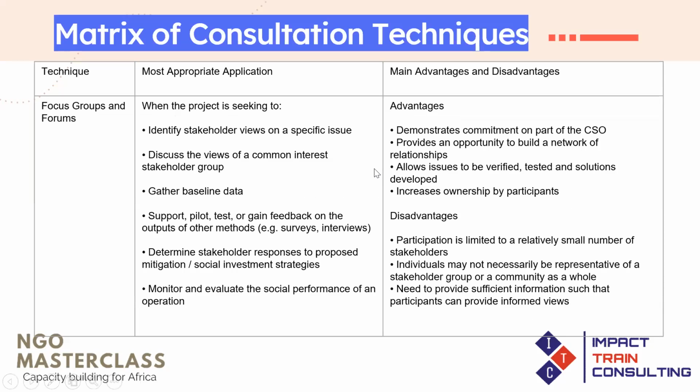Focus groups. You use focus groups as part of your consultation technique when you're trying to identify stakeholder views on a specific issue, when you're trying to discuss the views of a common interest stakeholder group, when you're trying to gather baseline data, when you're trying to support pilot tests or gain feedback on outputs of other methods, when you're trying to determine stakeholder responses to proposed mitigation or social investment strategies, when you're trying to monitor and evaluate the performance of a project, you can do a focus group discussion with your stakeholders.